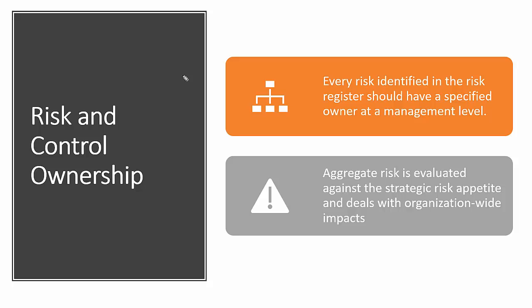One more important thing: owners should be empowered to make decisions on behalf of the enterprise. In general, the risk owner should be a senior executive or manager responsible for one or more of the business processes or functions that may be impacted. A risk practitioner should communicate with the risk owner to ensure they are aware of what risk responses have already been implemented and the responses that are pending implementation. That is the first part: every risk identified needs an owner.